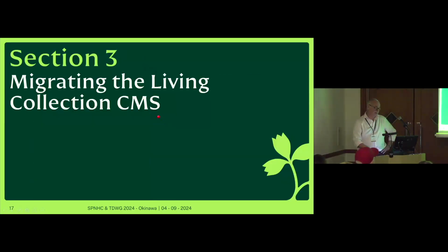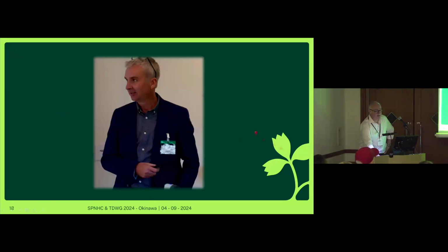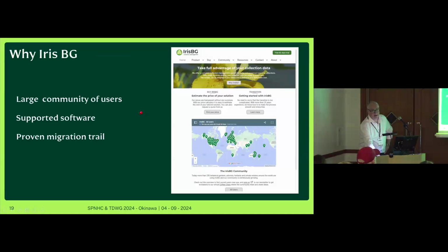Okay, let's go on to living collections to start with. To start with living collections, the first thing we did was to get a dedicated migrations officer on the staff, on a short-term contract, and that really, really helped, and that was great because it took some weight off some of the existing people.